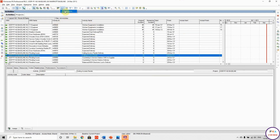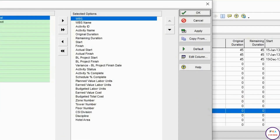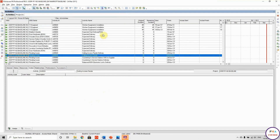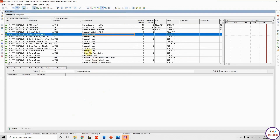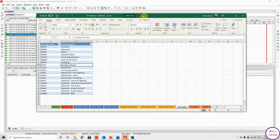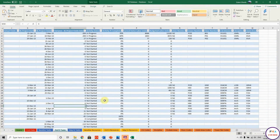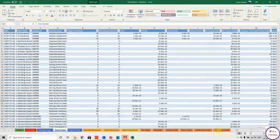For the columns, I have four main groups: basic activity information, dates information, earned value information, activity percent value information, and activity codes. I'll hit OK, then select all and copy-paste it into my Excel sheet. This is my database — this tab is for the baseline tasks data.